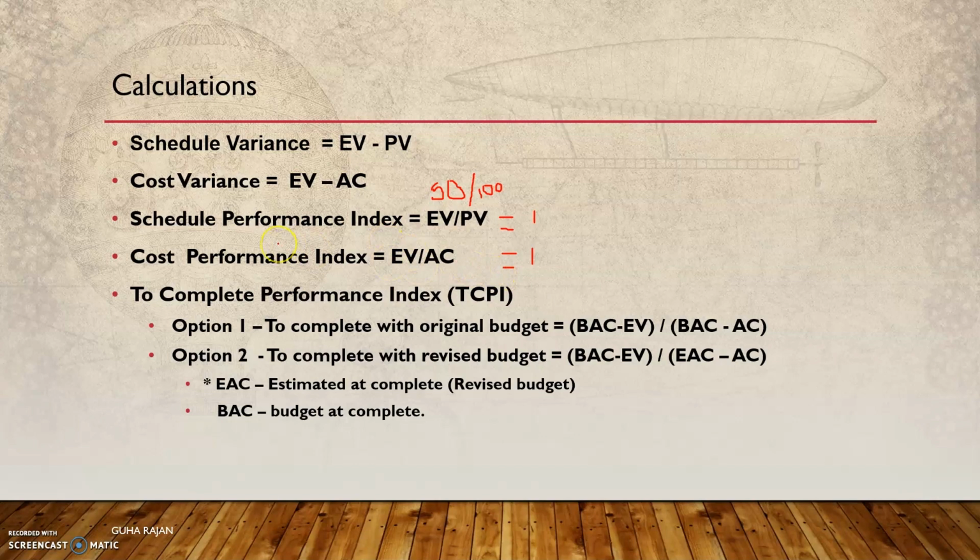So in that case, you are lagging behind in schedule and overspending if you are doing less work than what was planned or intended. Just like instead of making one table, you have worked only half the job. Yes, naturally, the schedule performance index is less than 1 and the cost performance index is less than 1.